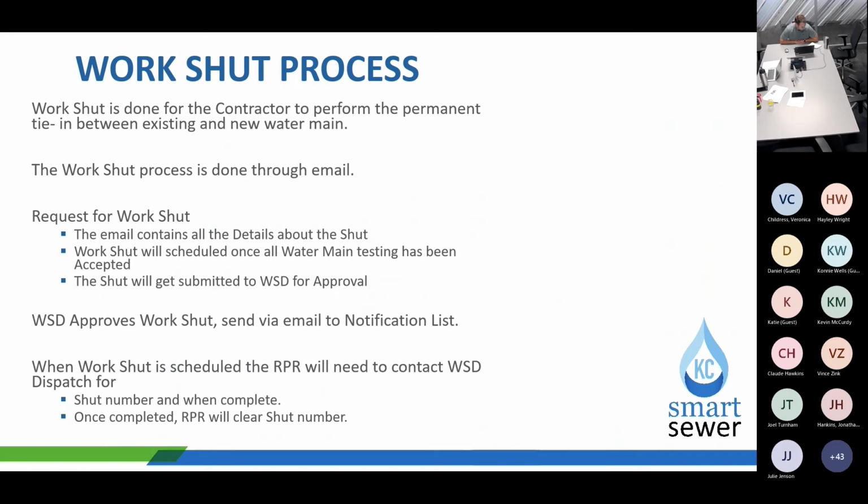These always truly do have to be turned in 1 week or at the minimum 5 days before this work shut actually does happen.